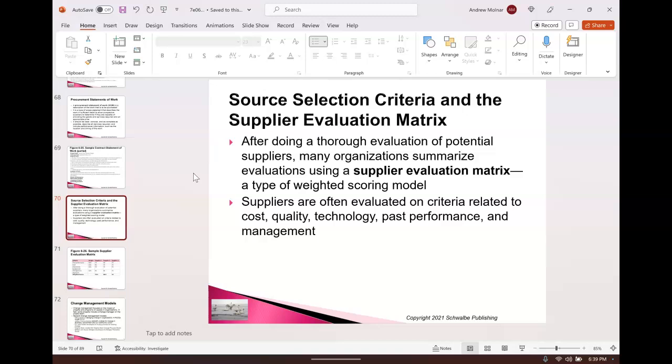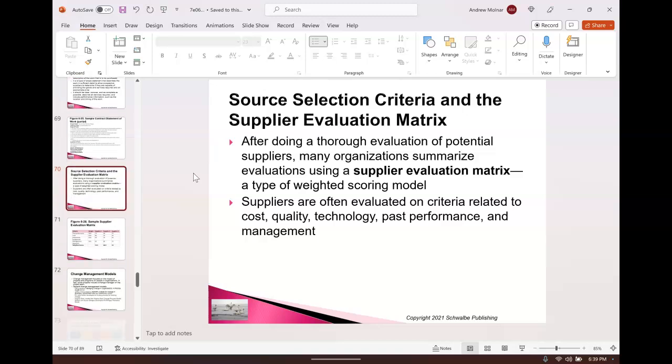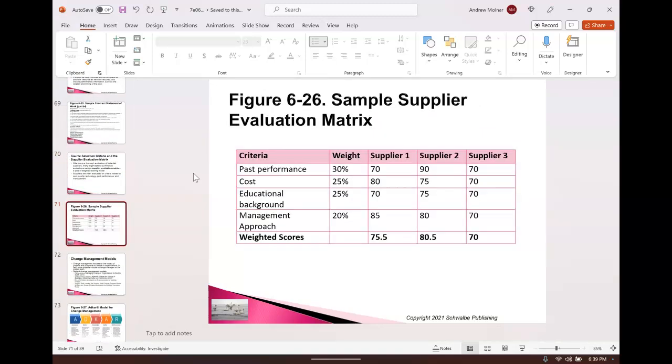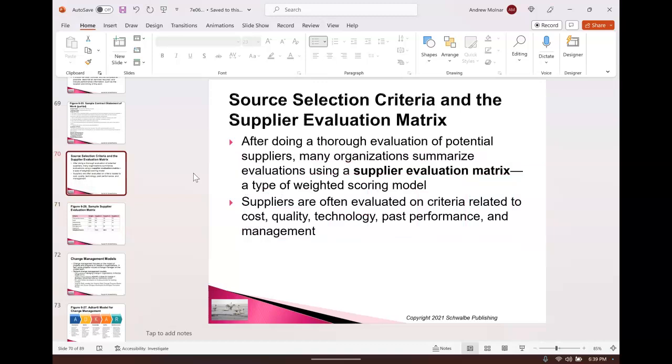Now, once you've put out bid documents, people are going to send you proposals, and you need to have selection criteria. You need to be able to evaluate fairly all of these companies. And to be fair, this should be determined before you even put out the RFP. Within your team, they will know what the evaluation criteria is, and you may share some of that with the suppliers that are bidding in the RFP or RFQ process.